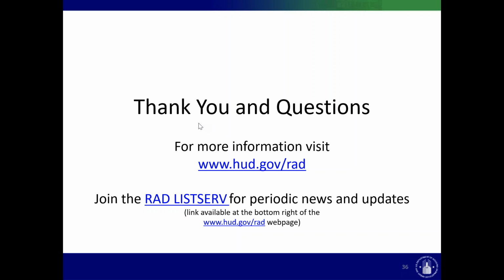There's a question about portfolio awards. If you don't make progress on your portfolio award, what happens? So our requirement is that starting in the second year from the portfolio award, the PHA closes at least 2 projects or 25% of the properties each year. If a PHA is not making progress, HUD may revoke the portfolio award. The PHA may be able to come back in and request new authority under RAD, but we will revoke a portfolio award if the PHA is not making adequate progress.